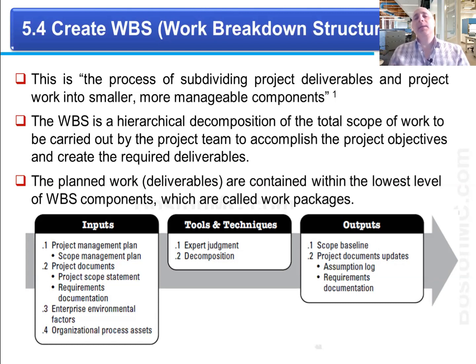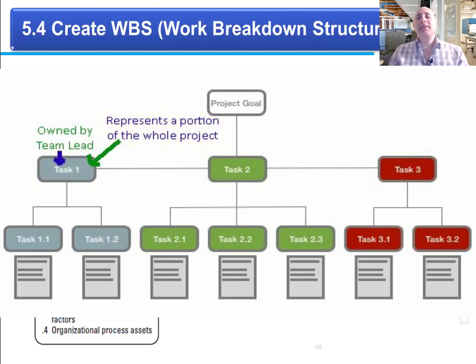Now, why are they easier to manage? Because you can take the whole lump sum work and break it into smaller, maybe task-oriented or nature of work oriented. So for example, plumbing work, electrical work, each would be separate, and IT work would be separate. So you could break it down as you wish, and then assign a team lead to work on each part separately. So this makes it easier for the team lead to focus on their own tasks.